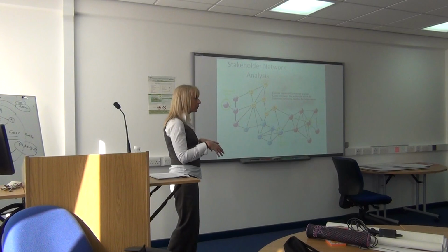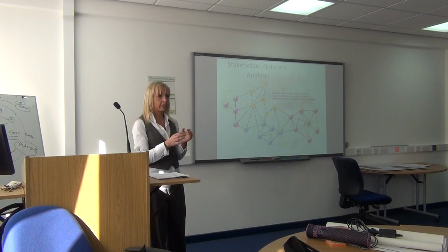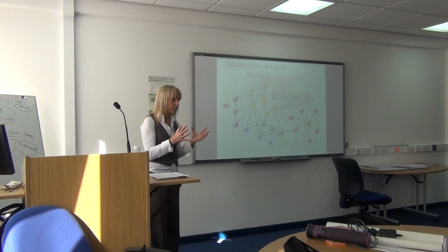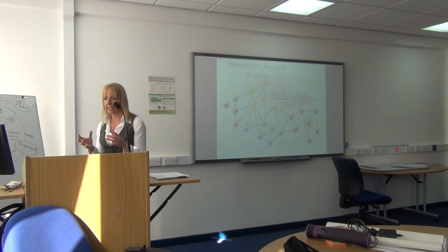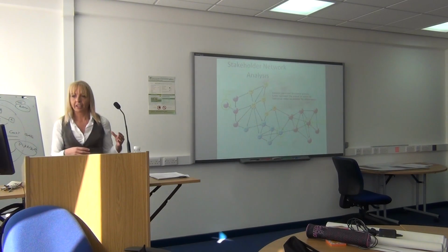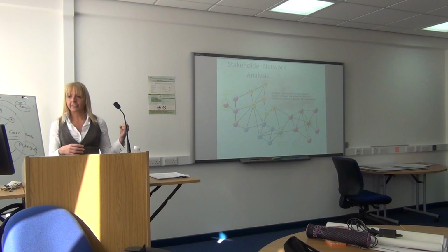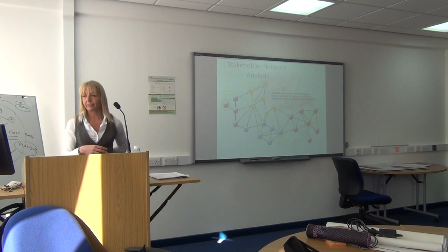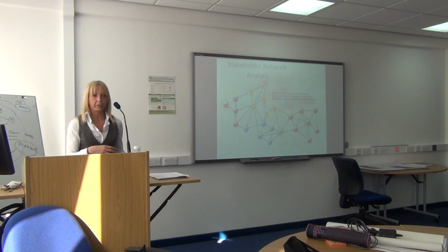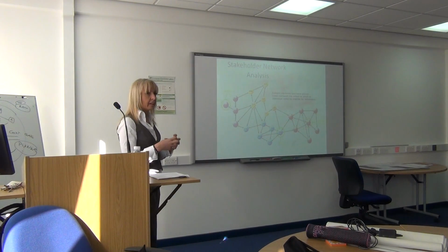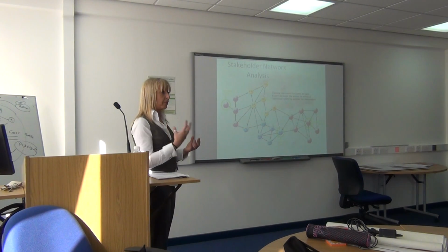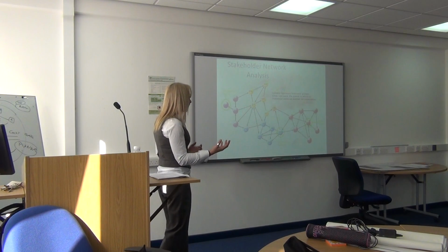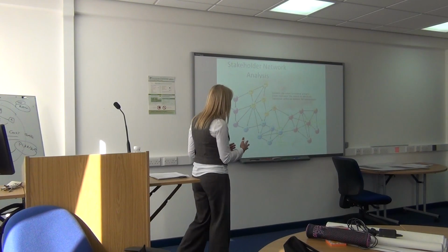It starts to also group these people in functions by colour coding their functional group within the analysis. And it looks at the peripheral person, the boundary spanners, and starts to identify central people, people who are central to networking, and where your communication efforts could potentially be concentrated.